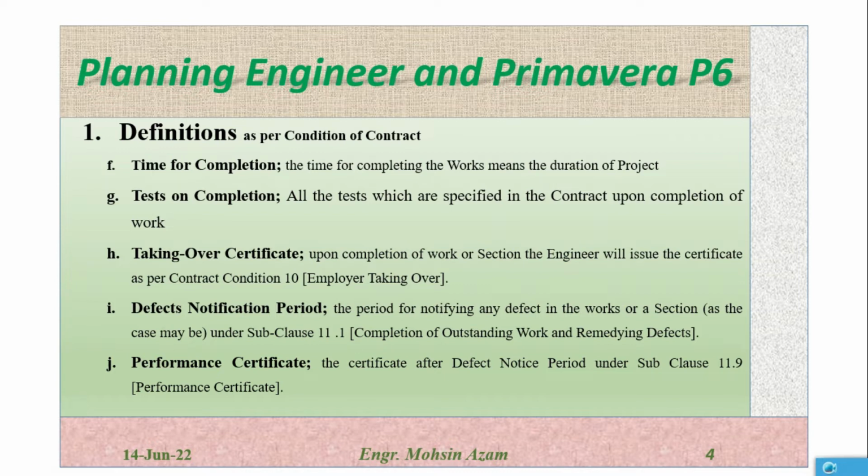Taking over certificate, upon the completion of work or the section, the engineer will issue a certificate to the contractor as per contract condition 10, employer's taking over. So taking over is the certificate which the engineer will issue after inspecting the site. And if they find that the work is completed, they will issue a certificate to the contractor.